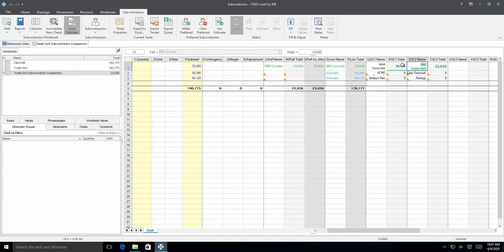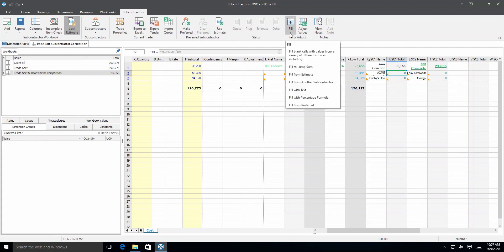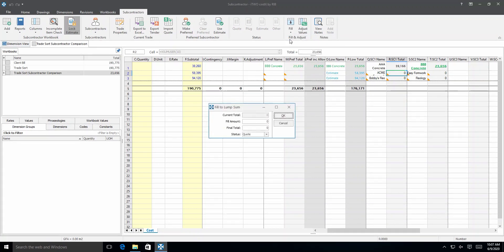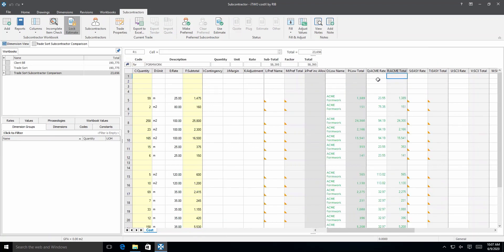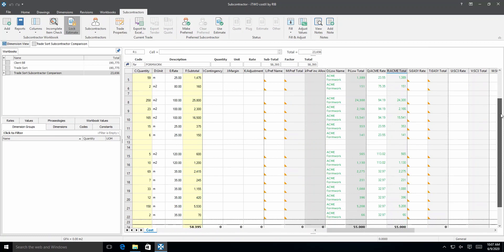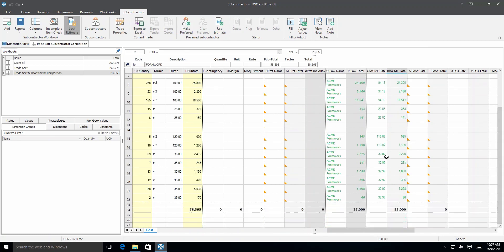We can also choose to fill any missing items from a lump sum. For the pricing of the formwork trade, let's assume that the first subcontractor has submitted a lump sum price with no rate breakdown. In level 1 of the workbook, click the total cell of the first subcontractor to select it and then click the Fill button. From the drop-down menu, select the Fill to Lump Sum option. Then in the prompt window, enter a lump sum in the final total box, choose Quote for the status, and select OK. Then drill down to level 2 and verify that the lump sum figure has been spread over all the items pro rata to the estimate pricing. The details are shown in a green color indicating the use of the quote price, and are also shown in the low column as this is the only pricing that has been entered so far.